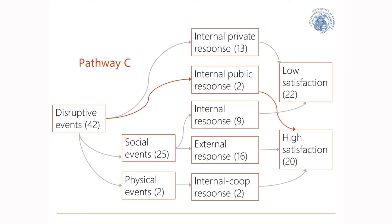Based on Pathways A and B, you'd assume an internal response never leads to satisfaction. Not quite — sometimes it does work, but only if the public actor takes the initiative, not the private one. Public agencies are somewhat more sensitive to context than a contractor is. Builders want to build stuff; they don't care as much about the environment. So public agencies actually can solve problems with an internal response. In another pathway, if they cooperate, an internal response can also work, but only in the case of a physical event.